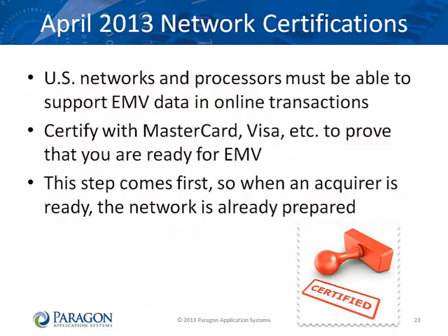MasterCard, Visa, American Express, and Discover mandated that acquirers and processors must be able to support EMV data in online transactions as of April 2013. This was an important first step. Once your connection to these payment networks has been certified for EMV, you can begin the process of certifying terminals and rolling them into production.